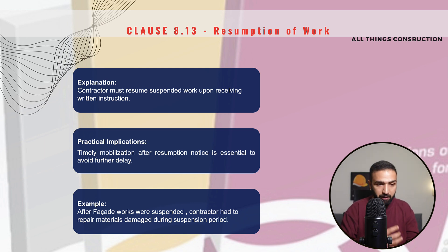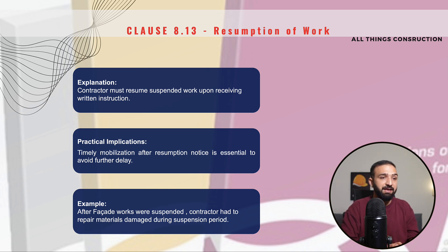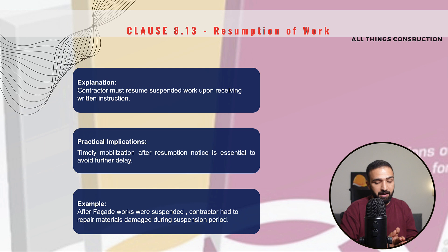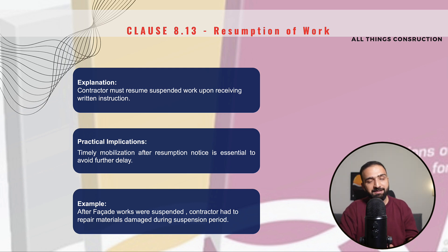In this inspection, for example, if the engineer finds that some elements of the facade were damaged during the suspended period, we contractors will have to rectify and make good these materials at our own cost. With that being said, this completes section 8 of the FIDIC Red Book. We will come back with a lecture on section 9 very soon — until then, take care of yourselves. Happy building!